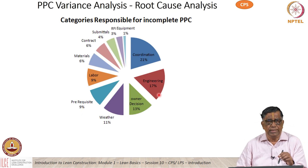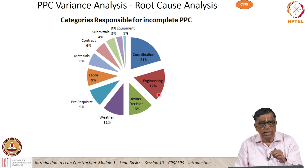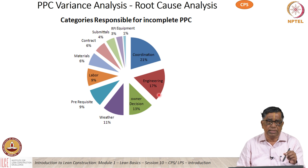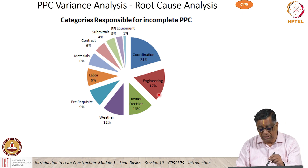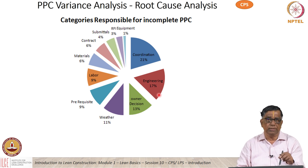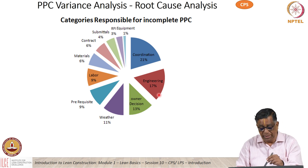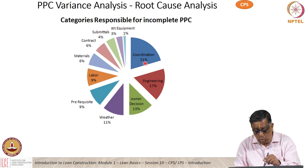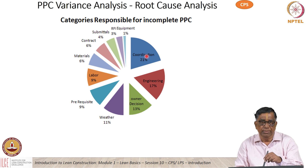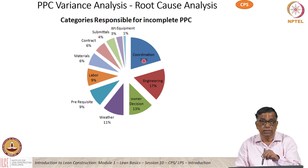Another important lean tool is root cause analysis. At the end of every day, the planning manager asks the front-line people why they haven't been able to complete 100% PPC. Depending on how many times a reason occurs again and again, we draw a pie chart — coordination problem, engineering, owner decision, and so on. We immediately understand what the main culprit is, and then we need to tackle it again and again.